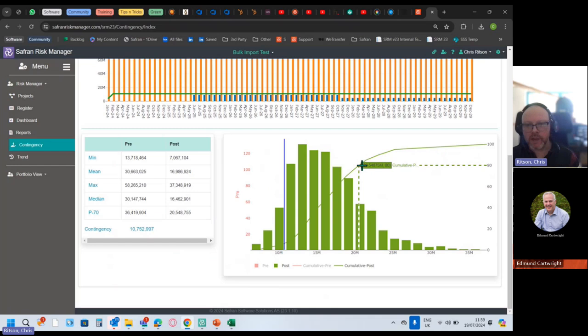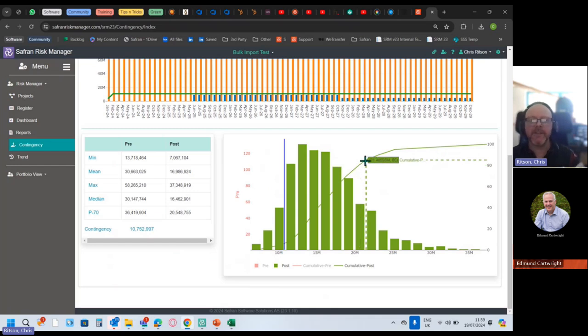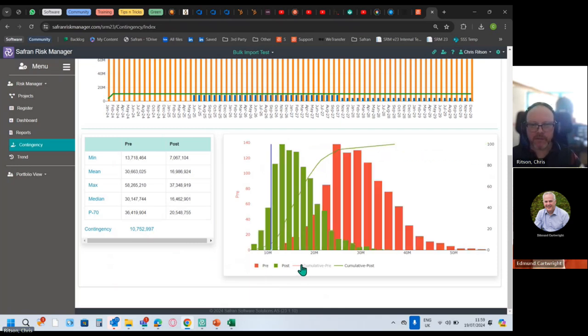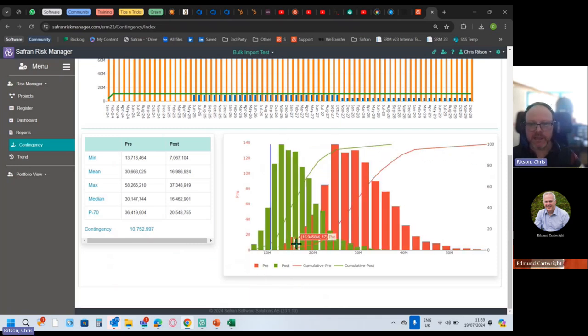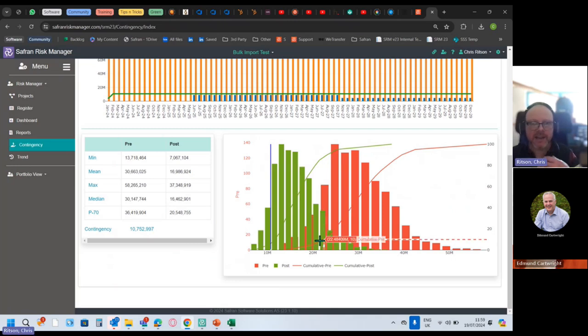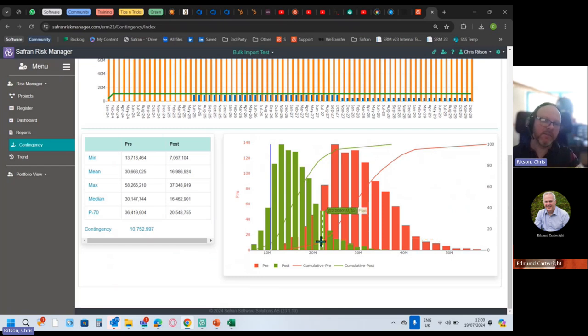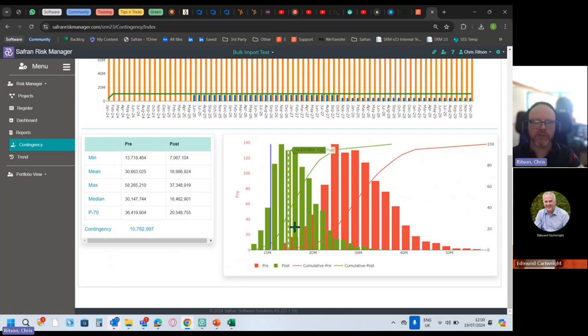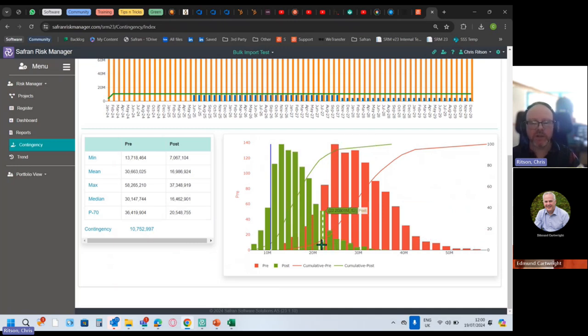If that blue bar was all the way up here, I'd have P85 confidence that assuming we complete the mitigation measures, it's going to be all right. If I bring back in my pre-mitigated view like that, P85 here is actually only about P10 pre-mitigated. So again, urgency around the actions completing them. Because if we don't, then we have to assume we're in the red picture and not the green picture, and the red picture is so much worse.